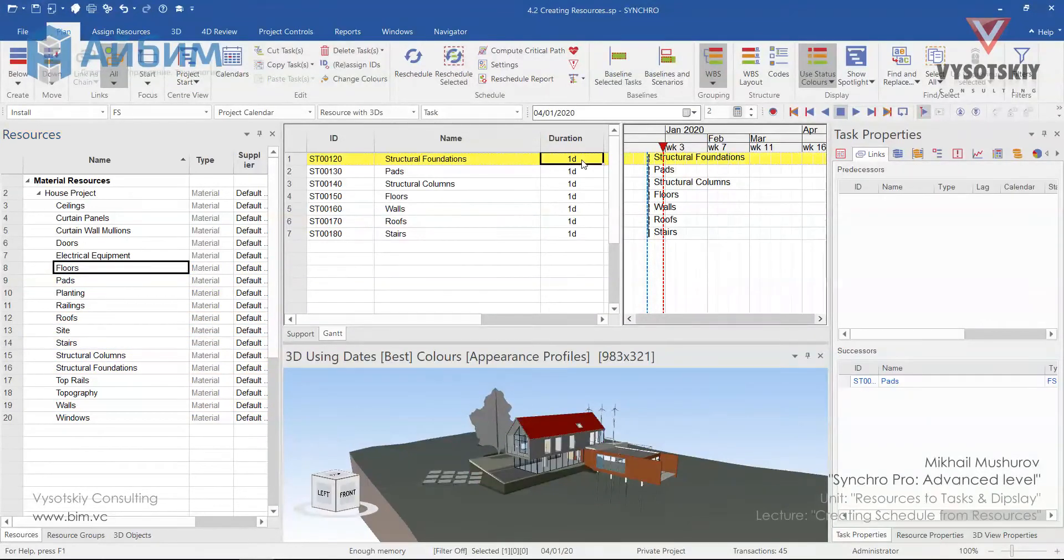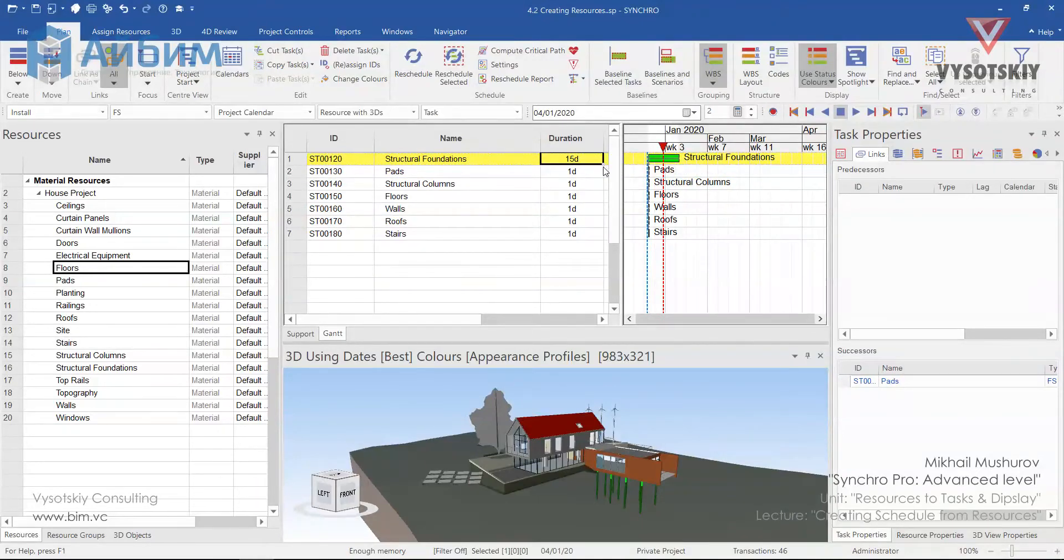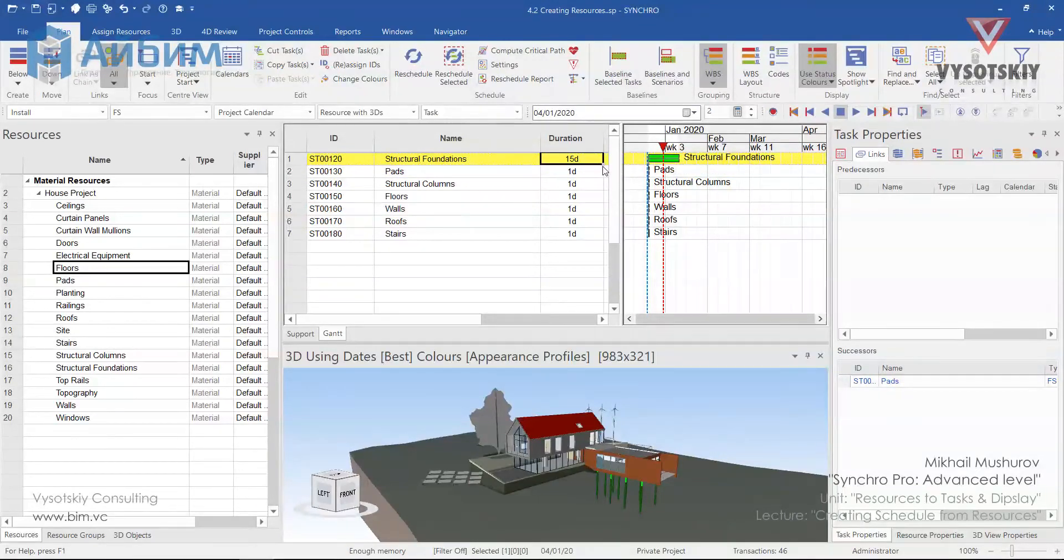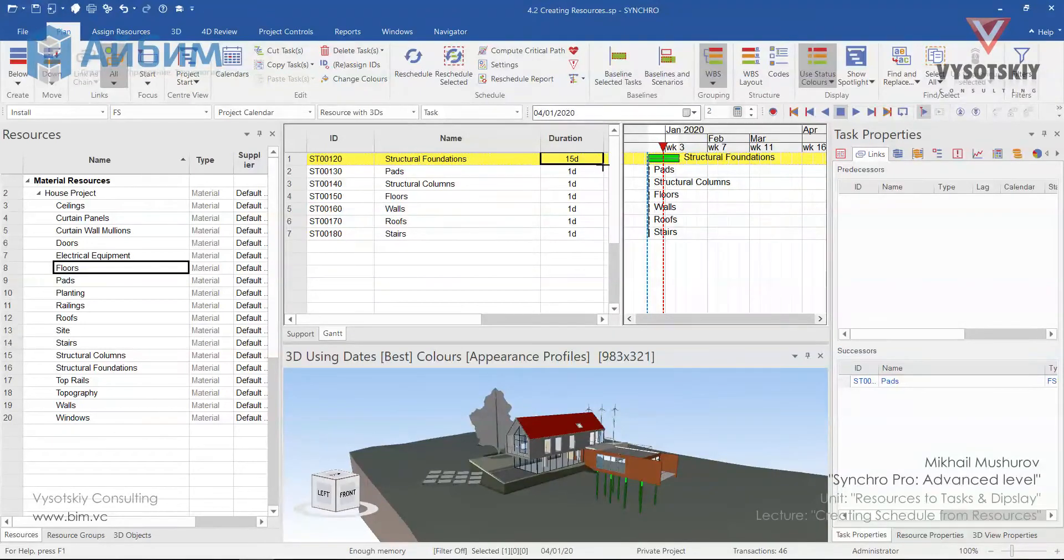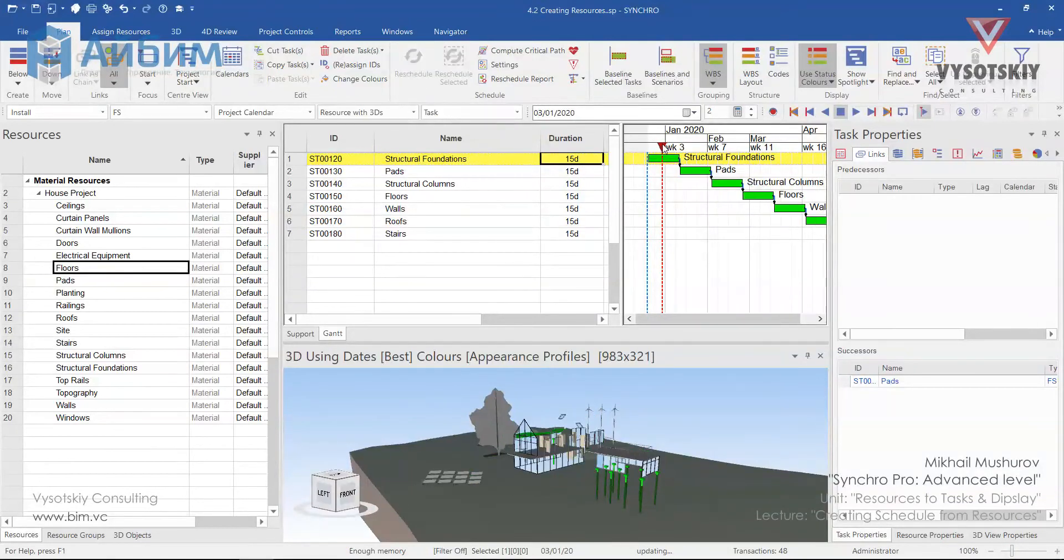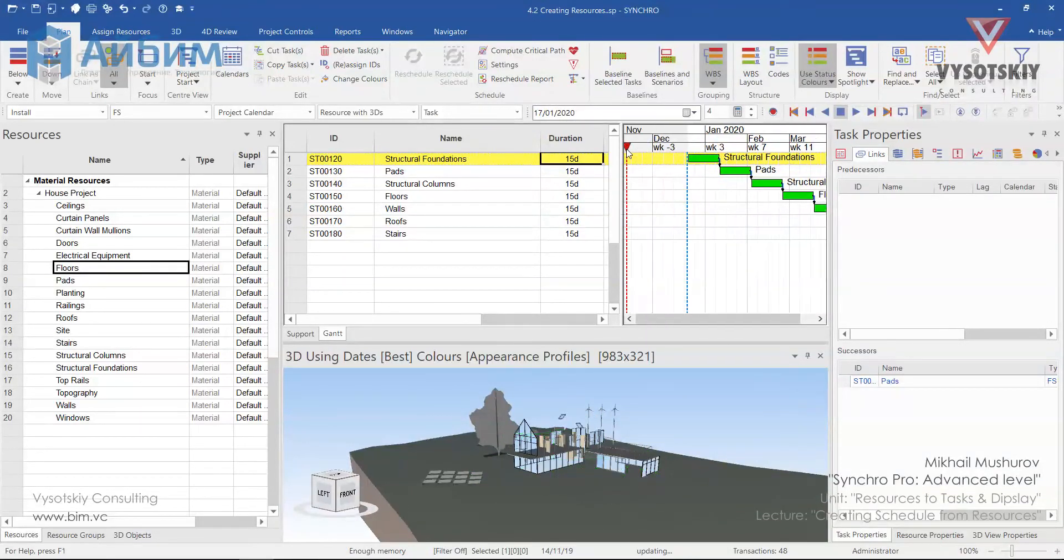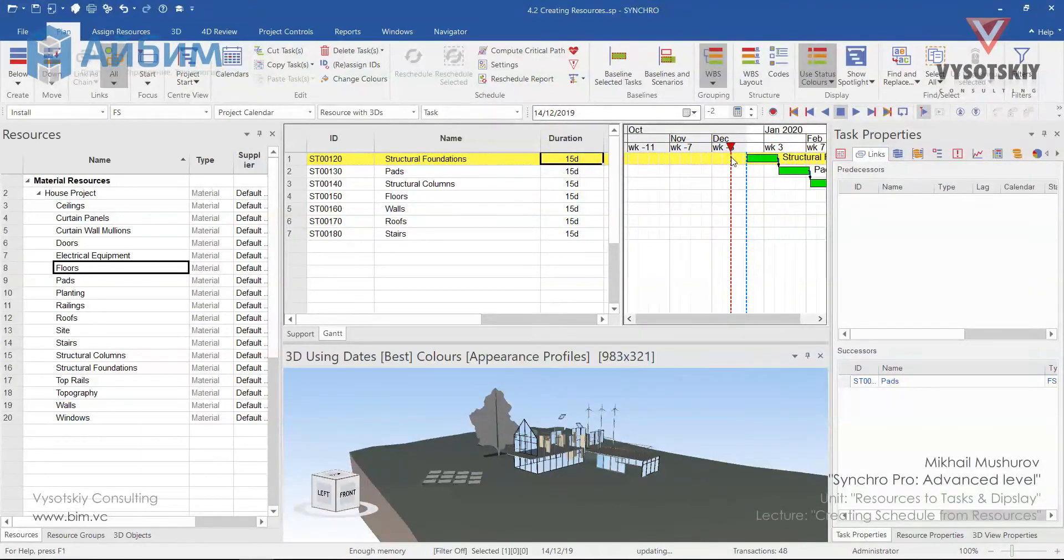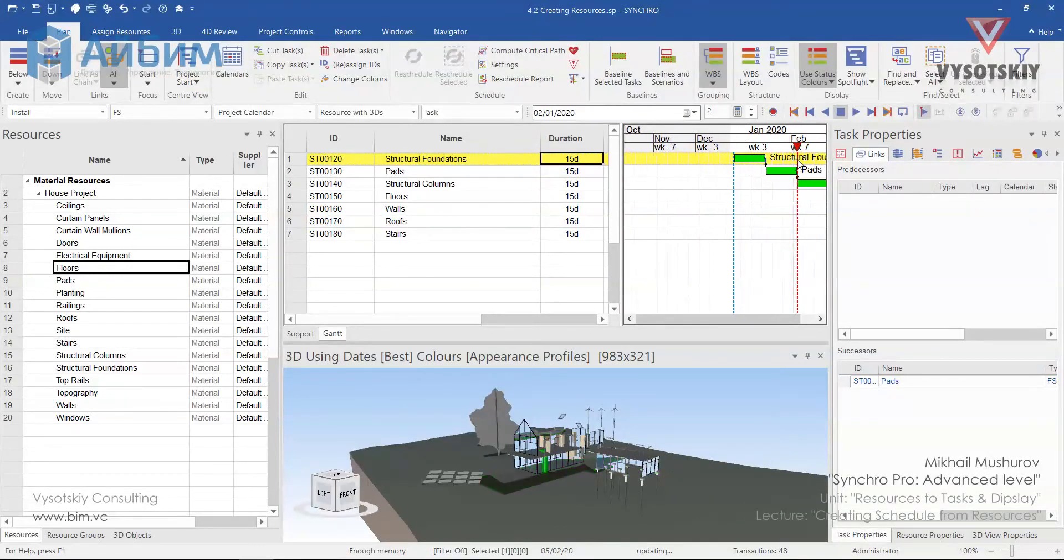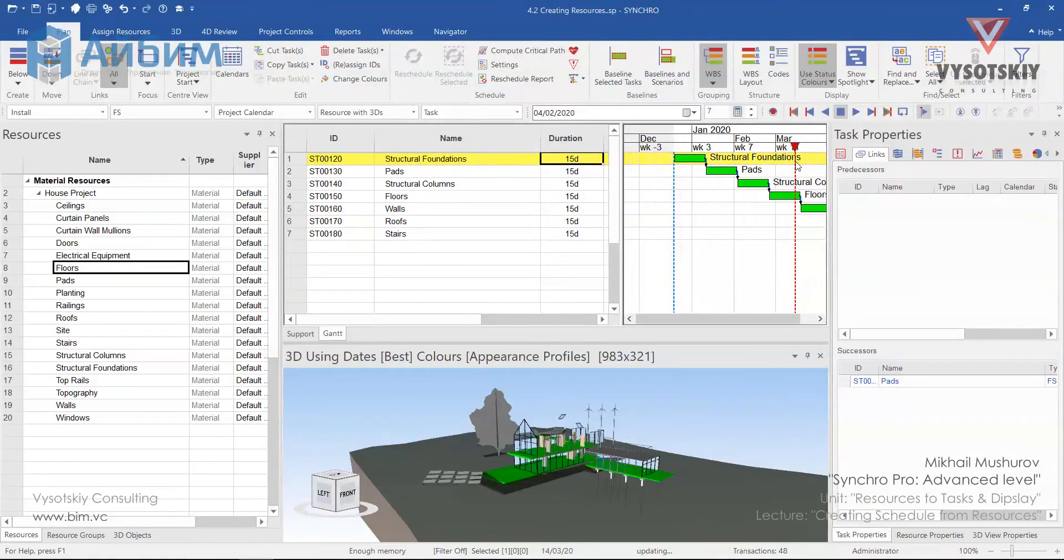Now, let's assign a duration of 15 days for all tasks. Type in 15 days in duration cell and drag down this cell by its right bottom corner down and reschedule the project. Now, you can play with the data date to hide assigned resources or to see the sequence of our construction.